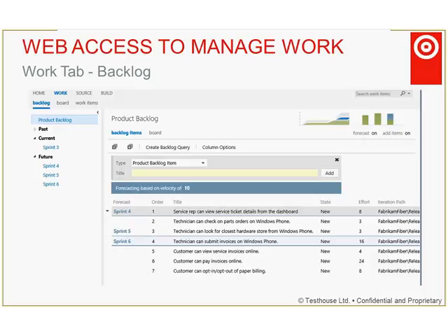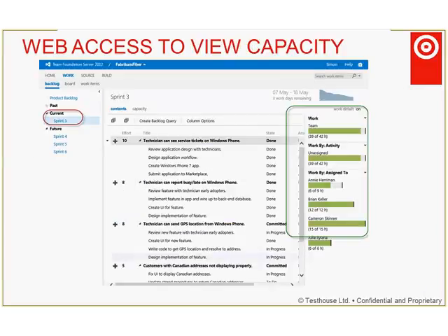And of course, items in the future sprints can have their orderings adjusted as the project progresses. And again, against each item we have an effort required to do that work, so you can gather as many items together as fit into the available effort of the team, so you balance the work out over the duration of the project, so that each sprint has a similar amount of effort to do its work. Another view of what you can see using Team Foundation Server to get details of your project.